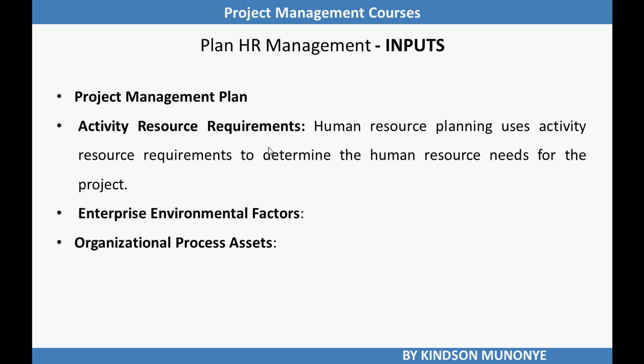And then we have organizational process assets. Some of them that can influence planned human resource management include organizational standard processes, policies, and role descriptions, templates for organizational charts and position descriptions, lessons learned on organizational structures that have worked in previous projects, and escalation procedures for handling issues within the team and within the performing organization.